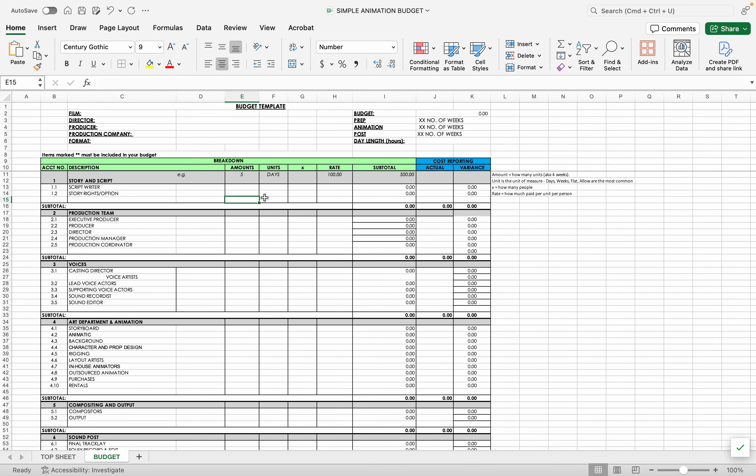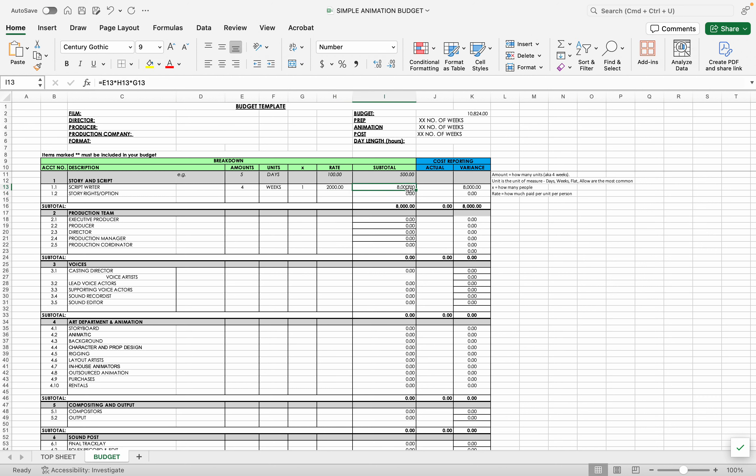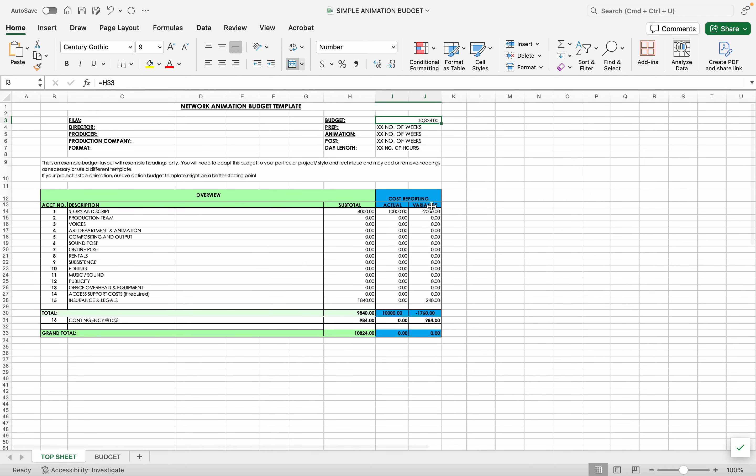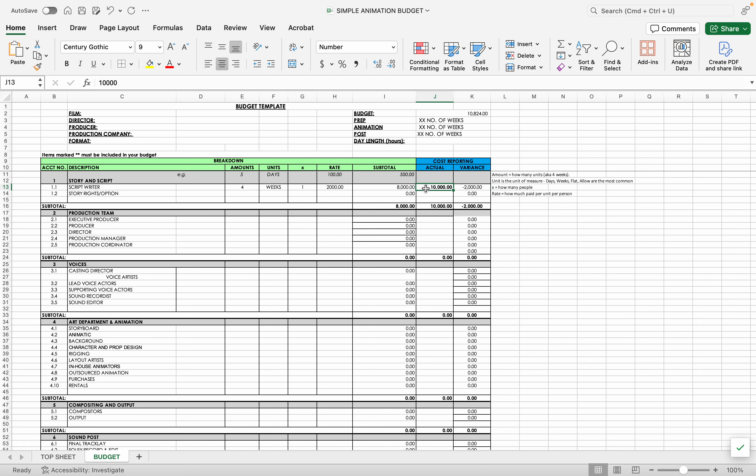So we'd say like if there is four weeks, let's do this for one episode for example. Four weeks, one writer and they're going to be paid $2,000 a week. So you see this subtitle here is $8,000. This is for cost reporting. Right now you haven't actually paid them anything. So the variance is $8,000. Let's say we've paid our scriptwriter now and it was actually $10,000. Now we have a negative issue. And over here you'll see the negative that, uh-oh, we're over budget. So that's what this blue is all the way across.